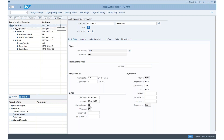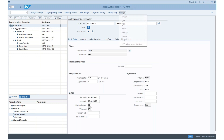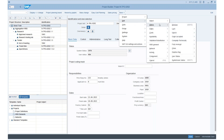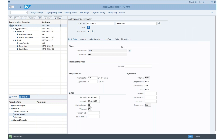That's why I want to change something in the project in SAP first. I'll start with the status — the system status is CRTD, which means 'created' for those not familiar with SAP. If we later want to do planning on this, we need to change the status and release it. I click here, say release, and the status has been changed to released.